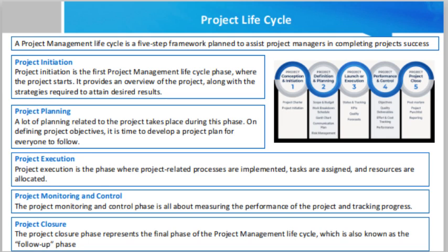Upon project completion and timely delivery to clients, it is the role of the project manager to highlight strengths, list the takeaways of the project, identify the ambiguities, and suggest how they could be rectified for future projects. Taking time to recognize the strengths and weaknesses will help to handle projects with more dedication. This in turn builds the project manager's credibility. Once the product is handed to the customer, the documentation is finalized, the project team is disbanded, and the project is closed.